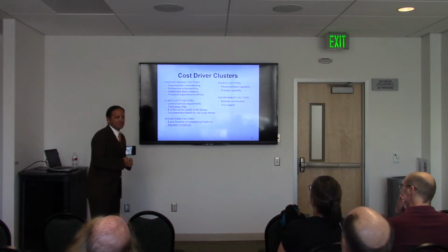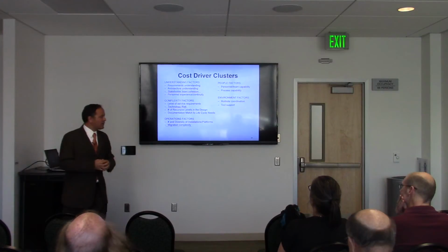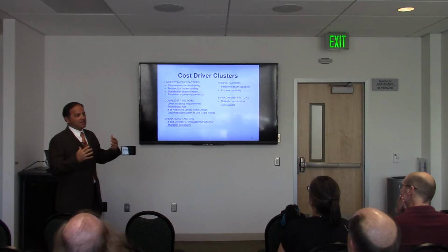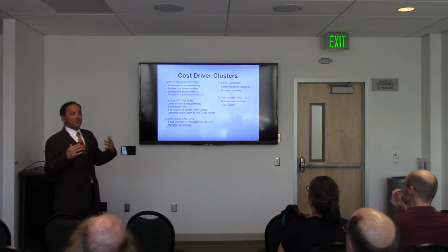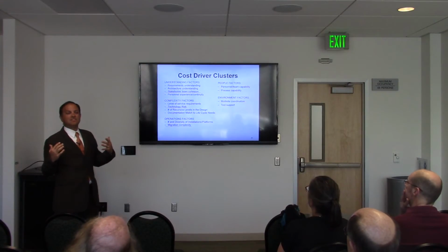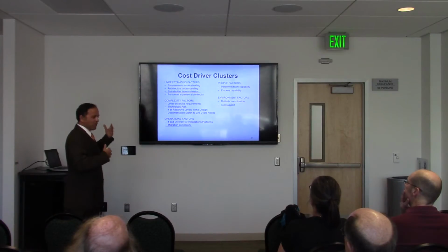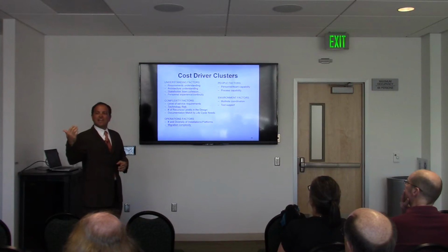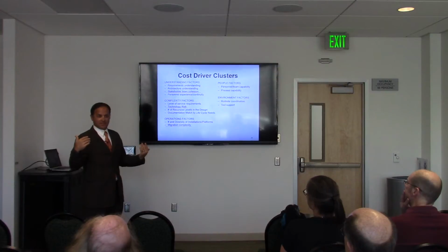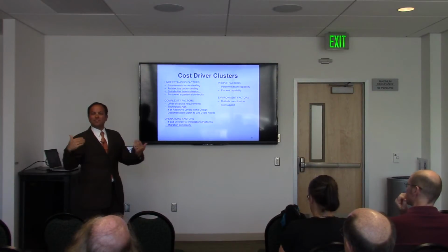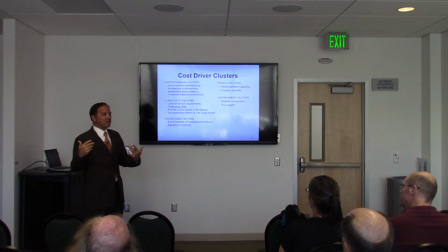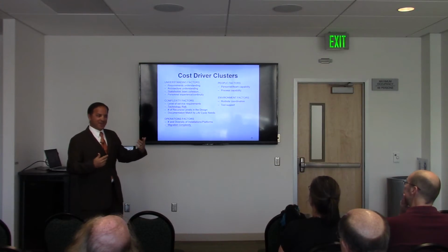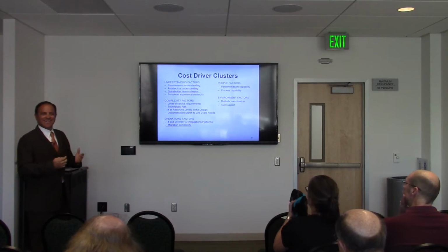The top right covers issues that have to do with people, and I actually borrowed that idea from the software models. As you can imagine, more experienced software programmers make fewer mistakes, fewer defects. Same idea in systems engineering. We also quantify things in terms of defects. But even though they are more experienced and create fewer defects, they're also more expensive, right? So the question often is, well, what's the trade-off? If I'm paying somebody $150 an hour because they are the top programmer, is it worth it? Are they making truly fewer defects than somebody that I can pay $50 an hour, right? And the answer to that is it depends.